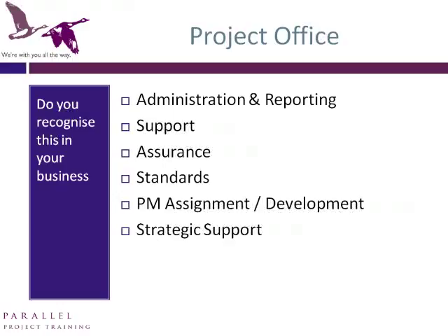Some organisations have a project office. These can have a wide range of functions. They can range from administrative support to the project team, support from specialist staff such as planners or risk managers, quality assurance, or the development of project management standards to apply to many projects. Ultimately, they can be the home of project managers and assign project managers to projects as they emerge. At the highest level, project management offices provide strategic support to the business, deciding which projects should be executed and when.